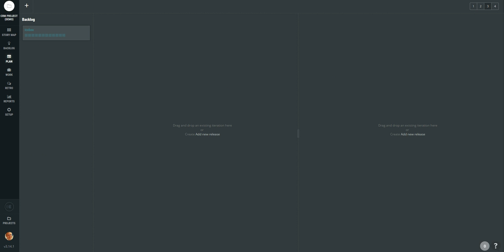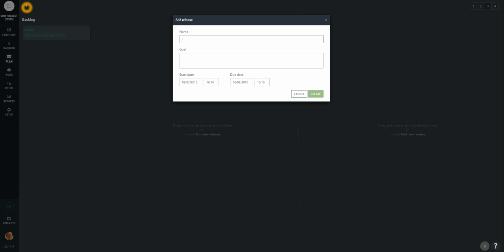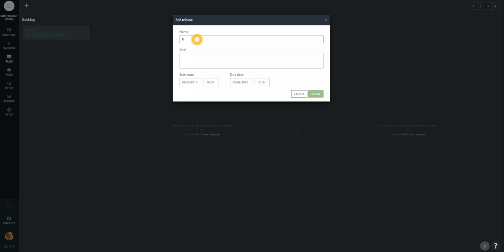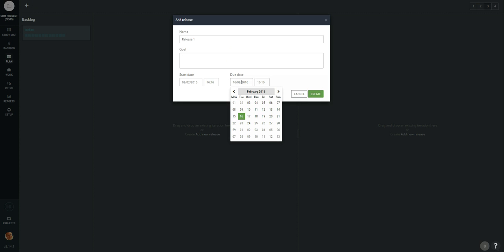As you can see we have an empty list of releases. So let's create a new release first. I am going to press the plus button at the top. Now let's enter the name of the release. It will be just Release 1. And you can also provide the goal for a particular release and also the day when you would like to deliver this release out to your customers.